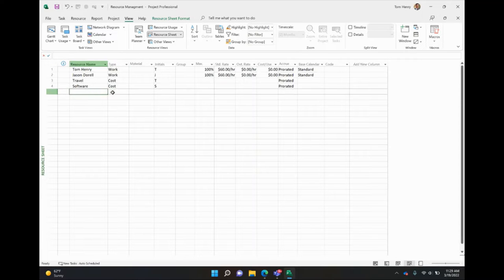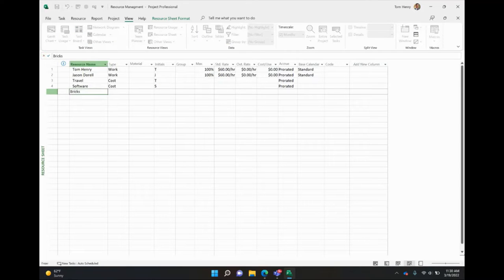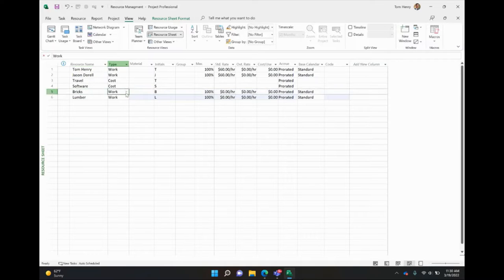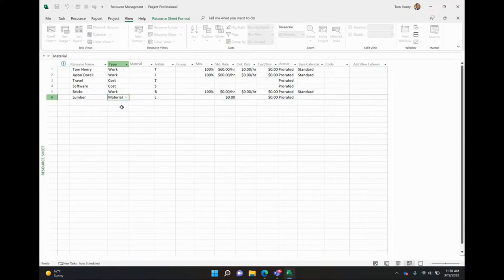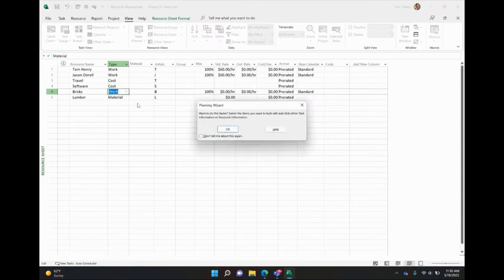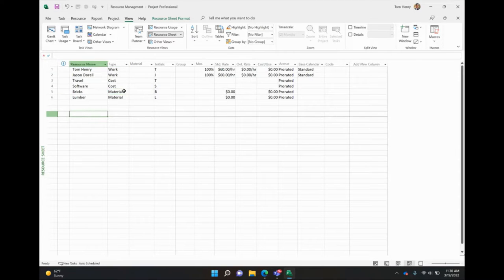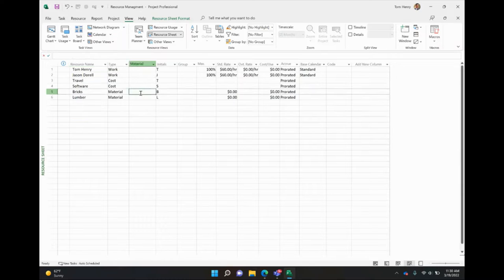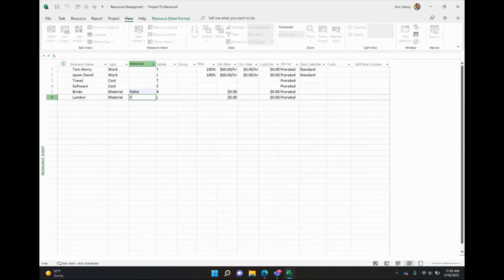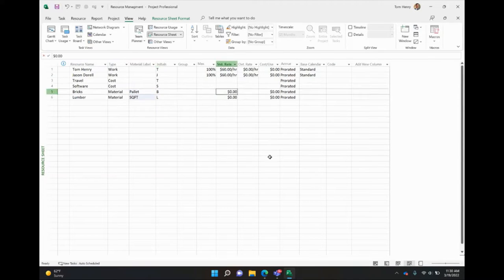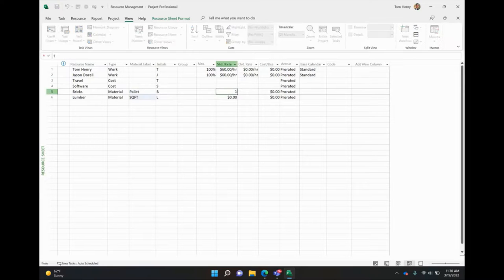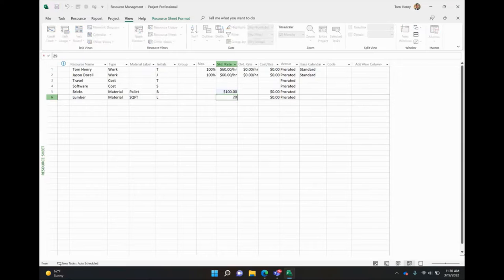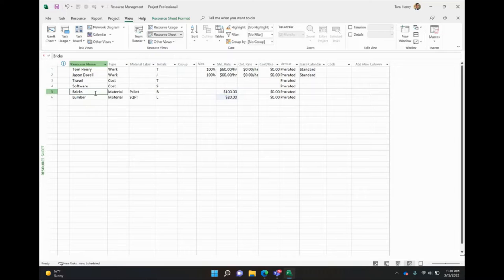The third type, material. So let's say you're building a house, you're going to need some bricks. Let's say you're going to need some lumber. By default, it's work. We want to switch that to materials. There's three different types, prorated, fixed, and material. Now the material labels are going to be tracked on a unit by unit basis. So for bricks, I actually need to give it a material. If I double click here, material label, this is only related to materials. And we're going to track bricks in pallets. For lumber, we're going to track that in square foot. And how much do we charge for a pallet of bricks? Maybe $100. Square foot of lumber, 20 bucks. So if you use two pallets, it's going to cost you $200. If you use $20, so on and so forth.